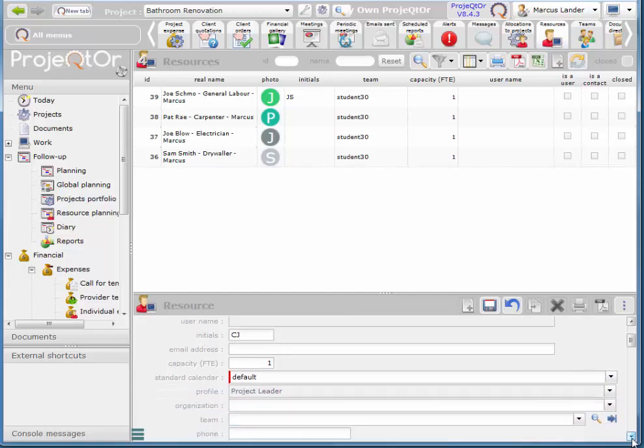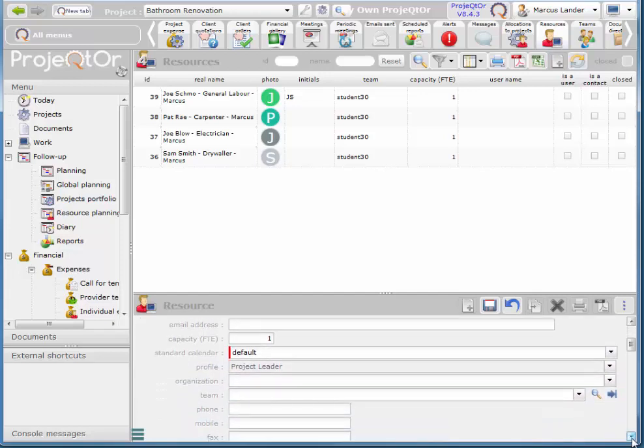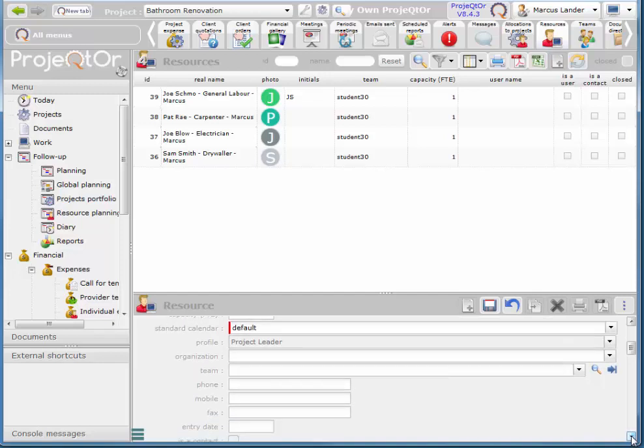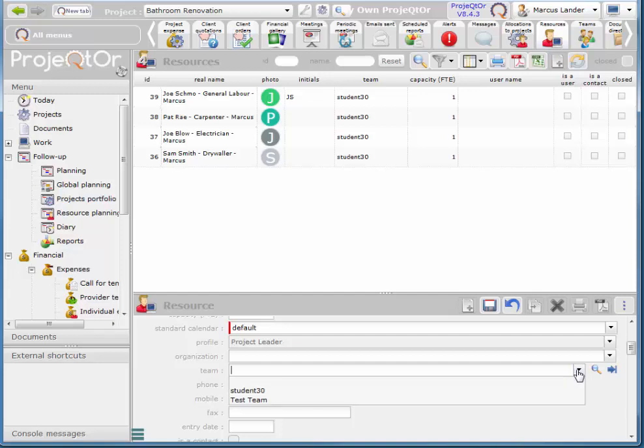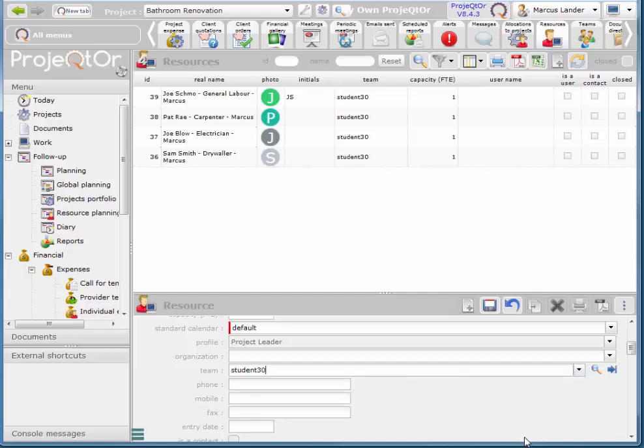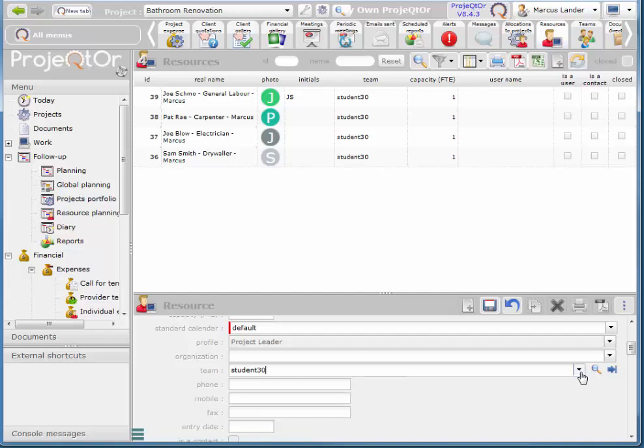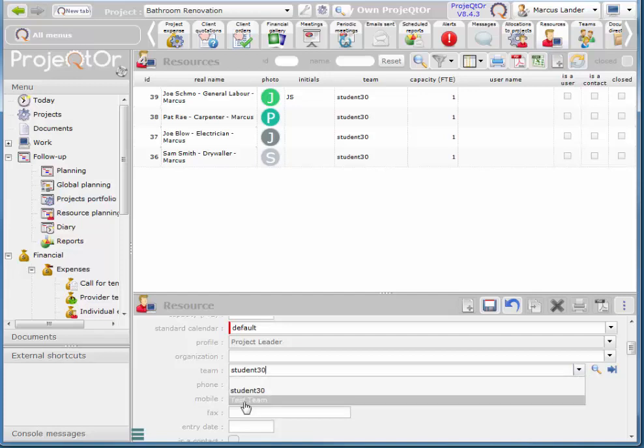And I'll say CJ and don't worry about the calendar. We're just using one calendar. In real life you do actually want each resource to have their own calendar if their schedule is unusual. So our schedule is Tuesday to Friday and I'm going to add Chris to my team.